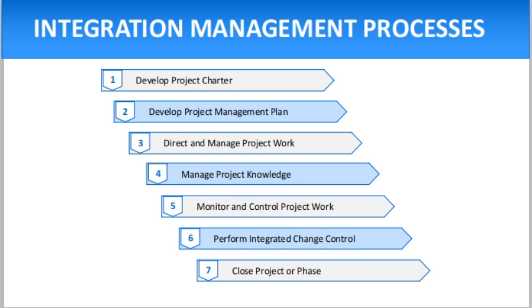The three approaches are preventive, an action performed to reduce the negative impact of project risk; corrective, an action performed to bring future project performance back in line with the project plan; and defect repair, an action to repair or replace a documented project defect. A common technique to measure performance is to do an earned value analysis to assess the current status of the project's budget and schedule. If project changes need to be made and are approved, project documents such as the work performance report may need to be updated.